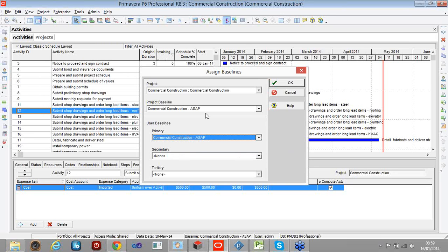So I can directly use the SDK to access the baseline and generate, right? I don't need to restore the baseline. Exactly, not with the SDK. There's a limitation of XER files that the baseline data doesn't get exported, so I have to read it as a separate file.